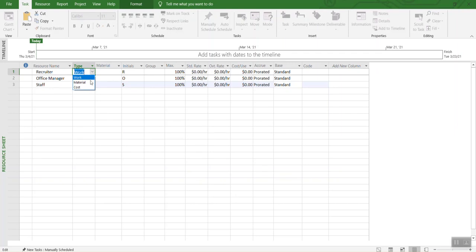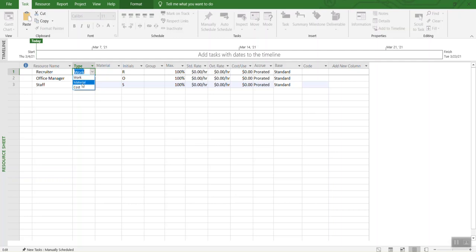We can always change it to cost or material if needed. Right now, these are the work resources. But if you are adding some kind of material like papers or stationery, then you are going to select materials. And if you are looking for cost, we are going to see the cost view in a second.